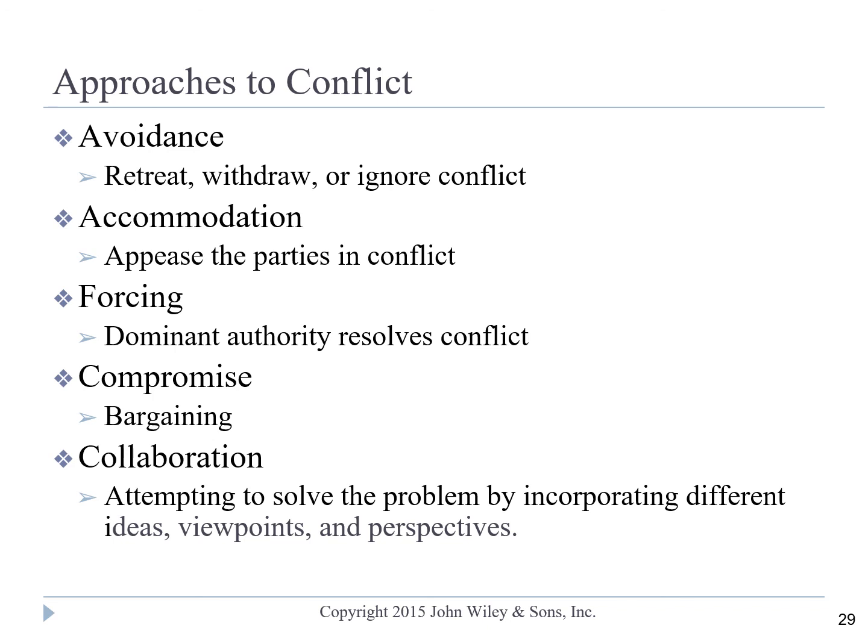Another approach is forcing our position. This is particularly valid if the power structure is such that we have authority over the other party, and we can force our view on the other side. Typically, if we resolve the conflict that way, it will not last for a long time.